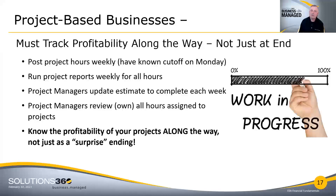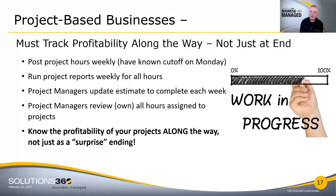We have to do tracking along the way. Finding out you lost the game because you didn't keep score until after the game is over is a poor way to play. We have to track profitability along the way, not just at the end. Simple guidelines: post project hours weekly with a known cutoff — all hours against a project must be recorded by Monday. Run project reports so that every week in your job performance meeting, you're looking at actual hours spent against that project. Project managers must update the estimate to complete, and must review and own all the hours. If random people are charging hours to a project, you can't hold project managers accountable for profitability.